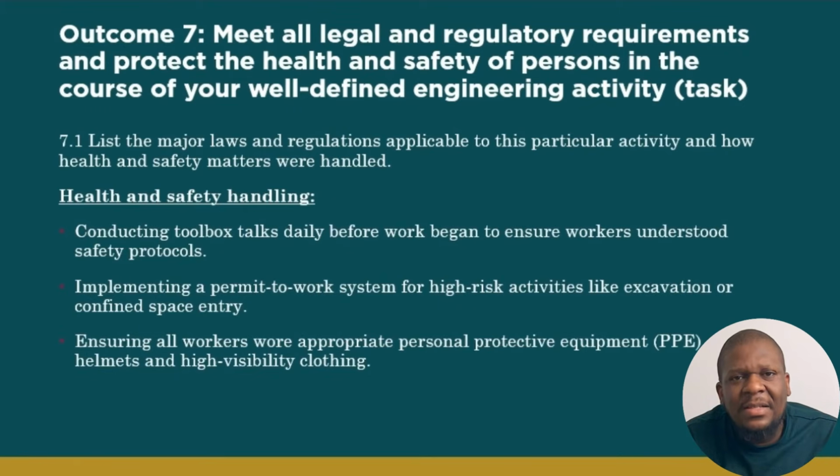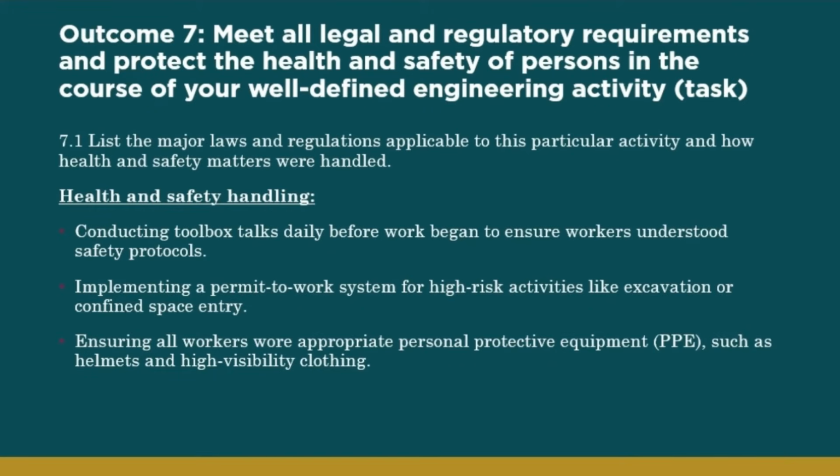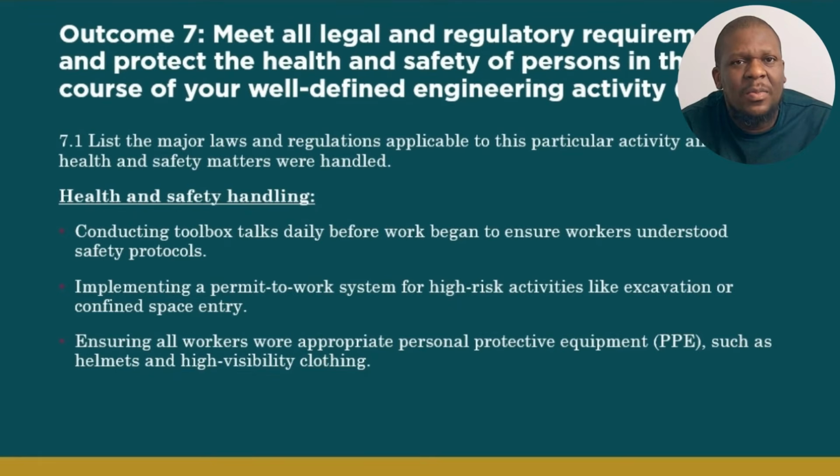Then, in terms of health and safety handling, you need to demonstrate how you conducted toolbox talks daily before the beginning of work to ensure that workers understand the safety protocols, implementing a permit-to-work system for high-risk activities like excavation and confined space, and ensuring that all workers wore the appropriate PPE, such as helmets and high-visibility clothing. So you are expected to demonstrate that you did implement these things in your project.